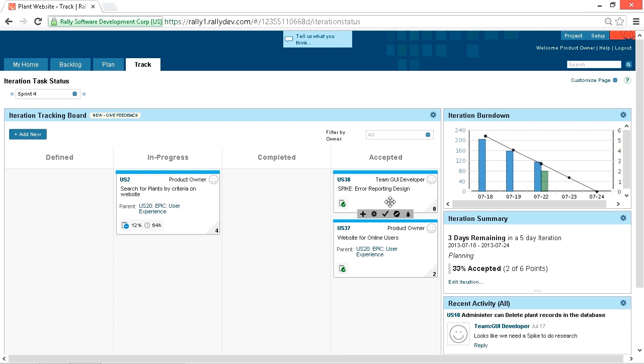So lots of times if you have a spike, you'll get a flat rate for a while. And the reason is because a spike has no story points. Remember, spikes are used to investigate areas of uncertainty. They do not add functionality to the product increment, so they're not going to have any story points. And your burn down chart is not going to show work getting done when you have a spike. So lots of times it'll look like you're not doing any work even though you are.